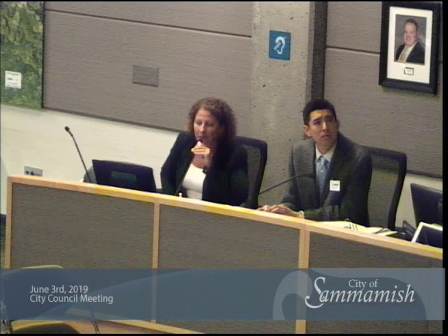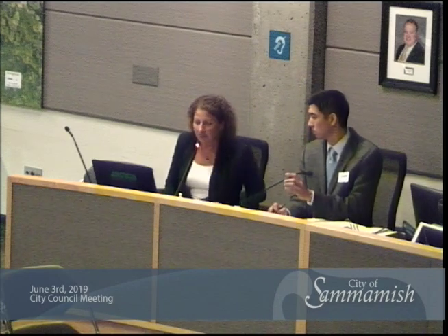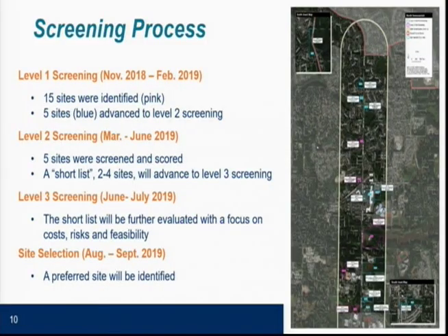Okay. So, is this still working? Yes, it is. So then the last few months we've been engaged in level 2 screening. This is where we take a more rigorous look with all of the criteria that we have, and we developed measures, again in partnership with King County Metro and the city, to try to measure how well each of these 5 sites is meeting the various criteria. And we went through a scoring exercise, and we're going to present some of the key advantages and disadvantages of those 5 sites in just a moment.